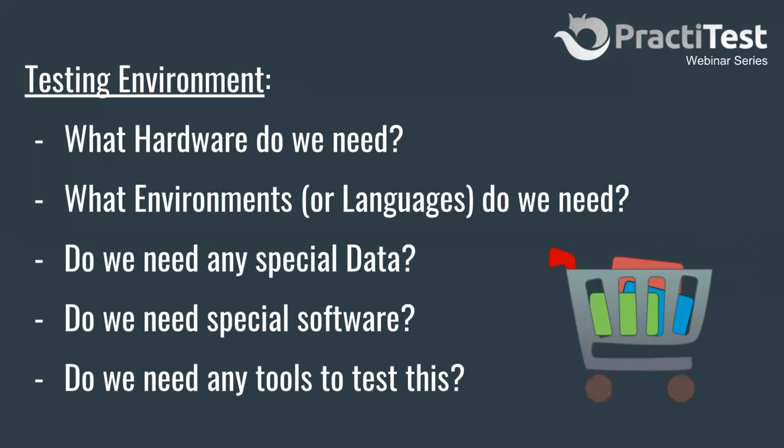Are you going to be testing mobile devices right now, and you need to have all sorts of mobile devices? A thing that I'm seeing more and more is that it's not only about the hardware, but you also need physical access to the local providers. So are you going to be working with partners in remote locations in the world, and you need to organize for that? Do we need any specific environments? Do we need specific languages for testing? Remember, environments take time. Setting up languages takes time. Even though there's virtualization and Dockers for everything we want today, it still takes some time to do it.